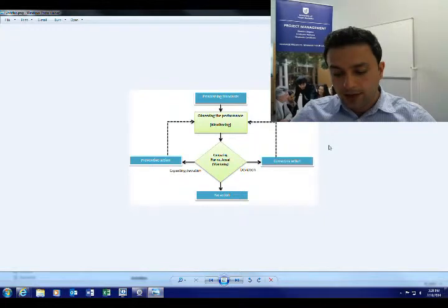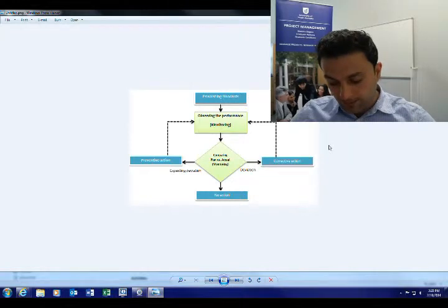Now, if there is a gap between actual and plan, considering a standard, then corrective action should be taken to close the gap, and that's called control. It means controlling the project failure and bringing the project back on track. Sometimes while you're monitoring the project performance, you envisage potential failure in your forecast, and to stop that from occurring, you take preventive actions. And preventive actions usually are cheaper and easier to implement.